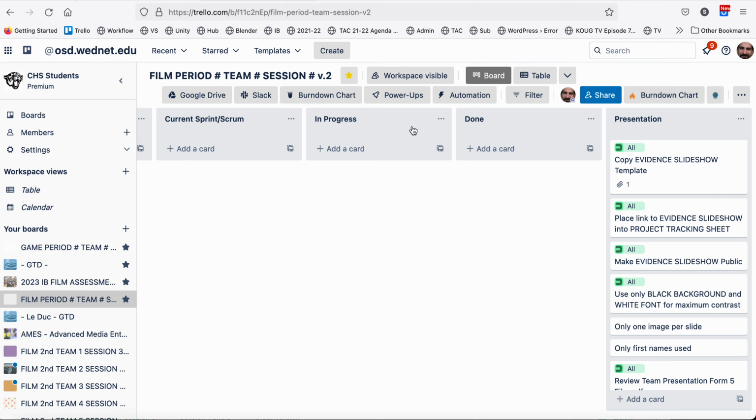And then you update the numbers at the top here on your burn down chart. You basically subtract whatever you put into the done column, you subtract the total number from your column number on the burn down chart. And hopefully this makes sense. Again, when you're in class, that should make sense.